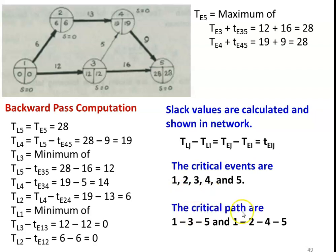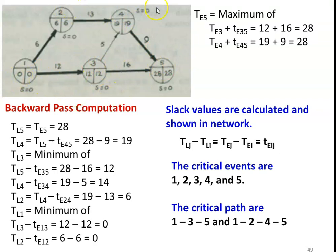The critical path in the network has two critical paths: 1-2-4-5 and 1-3-5. These are the two critical paths. Excepting the activity 3 to 4, all the other activities are critical activities.